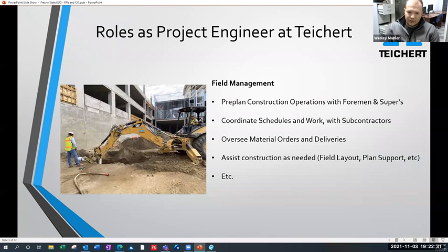And then we go through resource meetings where we pull up P6 and we select all the projects in a certain region. And we talk amongst all the PMs and PEs and superintendents about resource needs and how that team can best fulfill those.